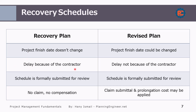The recovery plan applies when the delay is because of the contractor — it is the contractor's fault, not the client's fault. That's why we are going back to our finish date. The schedule is formally submitted for review, with no claims and no compensations. On the other hand, the revised plan — which we will discuss in detail in the next lesson — is where the project finish date could be changed, because the delay is not because of the contractor. The schedule should also be submitted for review and we could have some claims and prolongation costs because of these additional periods.